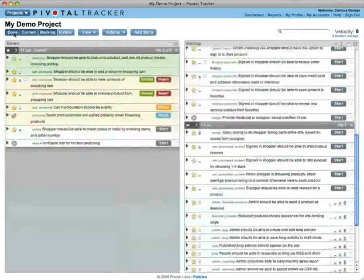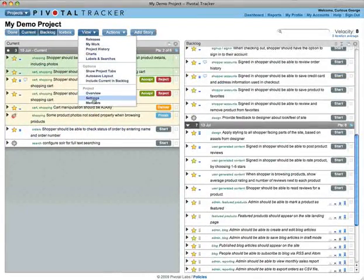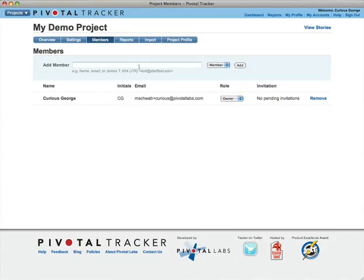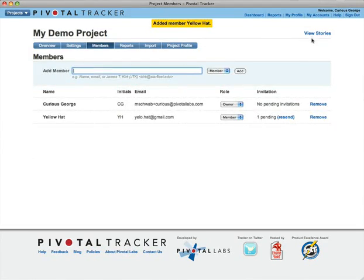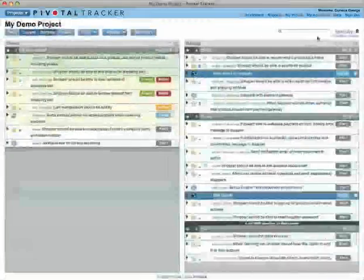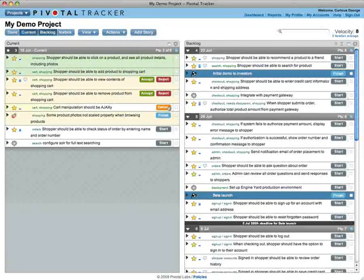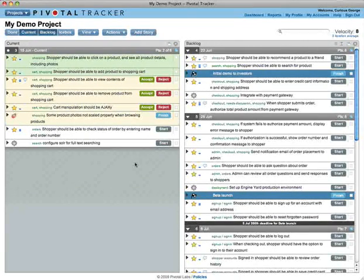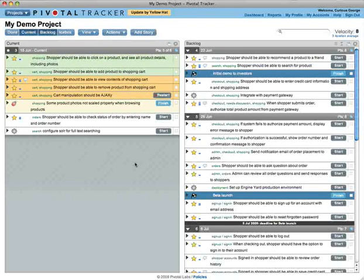So how do stories get accepted? Well, Tracker is built for a collaborative process, with emphasis on constant feedback. The developer can deliver the story when the feature is ready for review, but it isn't done until the product owner tries it out and accepts it. If it gets rejected, then it must be restarted.